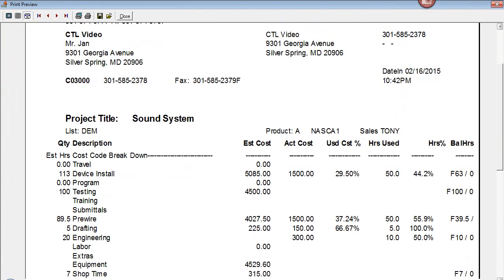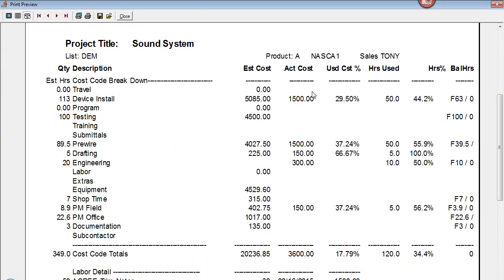So we now see our accumulated time for the different aspects of labor. So now we see we estimated 13 hours, and we posted 50 hours against this, and we have another 63 hours left in the budget. Right now, we're going to be equal. We'll be balanced out at 0 as long as we don't overshoot this thing.